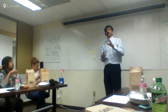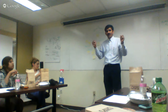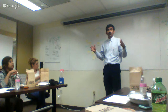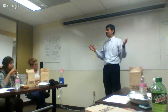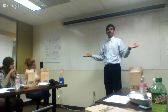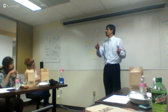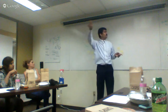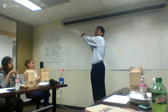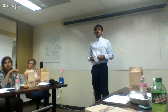Yes. The Scrum framework advises the team to be co-located, most preferably in one room because it's 5 to 9 people. You can fit 15 people here, so 5 to 9 people can easily fit in a room like this. You have all the place to put your statuses. Just one place. You can also post your statuses on the wall, the burn-down charts.